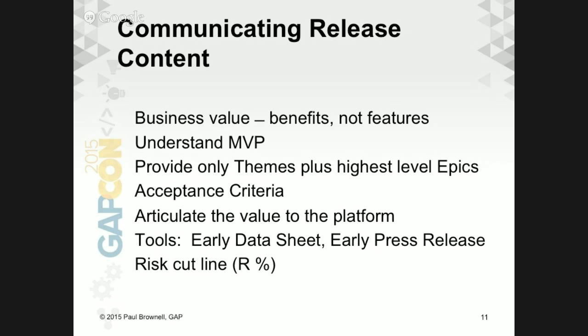Then sometimes I'll ask, okay, if today were the deadline and we were running behind, or we're over budget, either out of time or over budget, are there any of these 4 that you would throw away to get back on budget or stay on schedule? Or if we're behind, we still have to do these 4, and you'll extend the budget or the calendar. If they truly are the MVP, the answer is we wouldn't like it, but we would extend the budget or the calendar. We would be unhappy, but we would do it because it's that important.